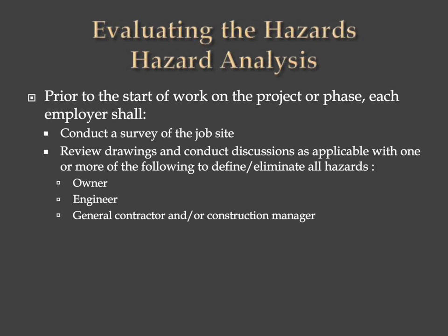If it's a new construction building, he needs to take a look at the plans and decide what it is that he's got to do and what the conditions are going to be. And then he needs to talk to the owner, the engineer, and the general contractor to see what their expectations are, so that you can do it in accordance with that and do it safely.